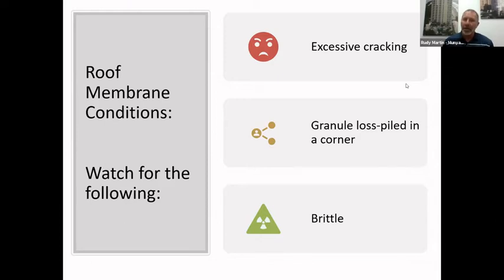they say, you don't have a lot of time left on this roof. You need to go ahead and get this roof coated. And it's a $200,000 roof coating project. They say, you know what? We don't have the money this year. We're going to wait till next. Well, next year was too late. When the inspector came back out in just 12 or 18 months, they said, this is no longer a candidate. Your $200,000 bill just went to $4 million because you have to do a complete roof tear-off. Every year matters.